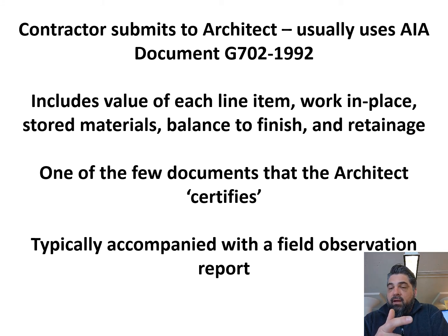Because if you don't have those two things, or the third thing you could do is go out and observe it, and you want it to be segregated from all of the other materials that are in that same storage area, whatever that storage area is. And so it's best to not approve any stored materials offsite, but in a pinch, those are things to consider.